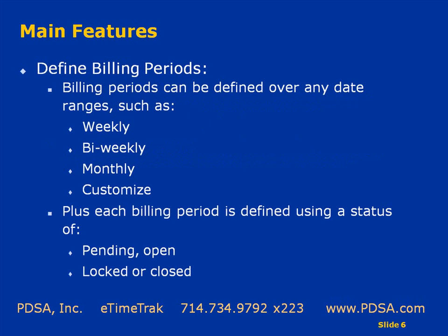Billing periods. Billing periods can be defined over any date range. It could be a weekly, bi-weekly, monthly, or customize a billing period. For each billing period, you can define a status, whether it's pending, open, locked, or closed. And a billing period that's pending is one that's in the future that you do not allow time to go into, but you've defined it. That way you could define a whole year of billing periods if you'd like, but only allow time entries to be placed in open billing periods.